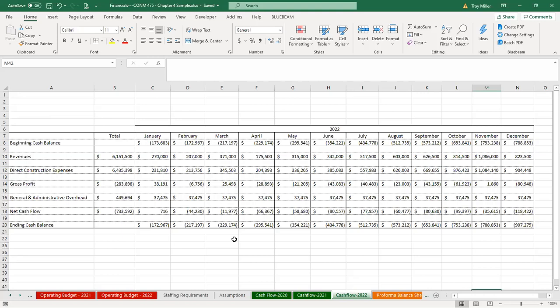So considering that, and the terms of payment that contract's going to get paid from the owner on larger projects, I'm going to have a much larger cash flow need to be able to pay all my bills. You can see that by the time I get to December of 2022, I'm going to need close to $1 million of cash flow to be able to pay my bills.